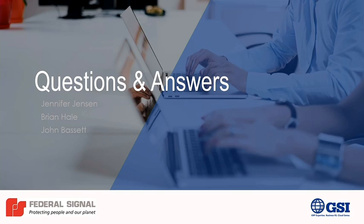We had their directors on when everything was good, and then we had a second follow-up call once we kicked off the phase 2 upgrade project. Everything was going to be fine, but we didn't know that it would impact a couple of our internal customized programs. We're passing data from one table to another table, and it wasn't working. So we actually had to re-platform probably in the last month prior to the project going live, and Vertex helped us with that without any issues. But it was a platform shift. So I would ask you, think about it. Ask if you're the only customer on that version doing that one thing, because that did get us a lot of nights.